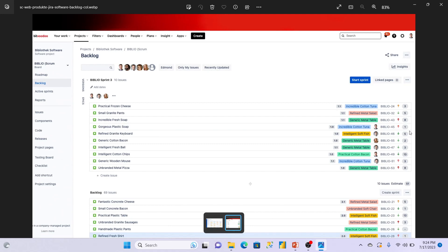For example, let's take the sales report where all teams' work needed around 10 to 12 days. For that, there are around 13 or 14 story points. So if these are 3 story points, this story will need around 3 to 4 days. For 5 story points, we need 5 to 7 days. For 1 story point, it will need a single day. For 13 story points, we need 13 to 15 days to complete that report properly across BA, database, Power BI, and QA teams.